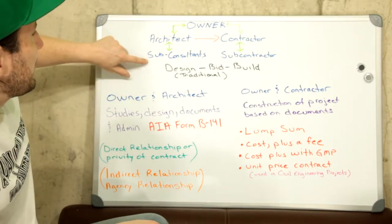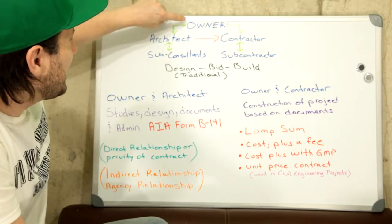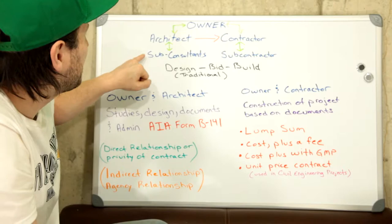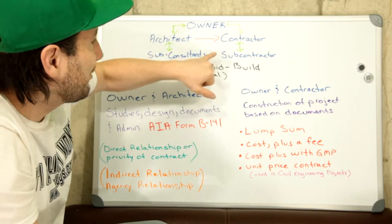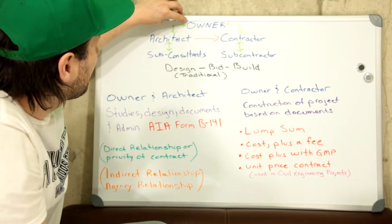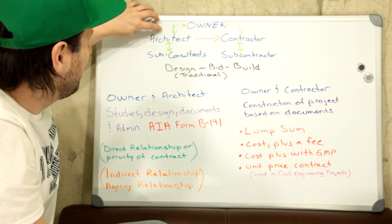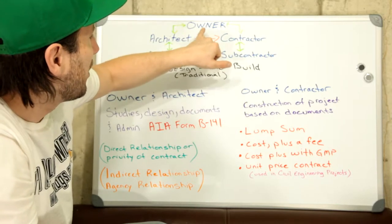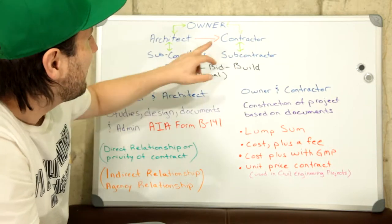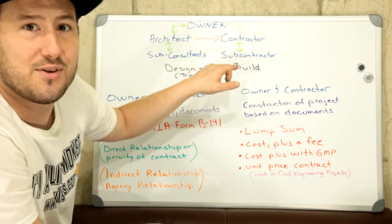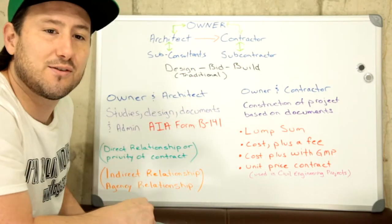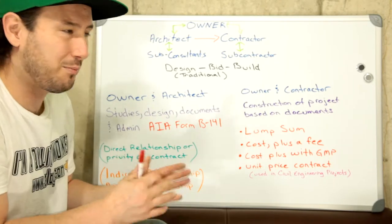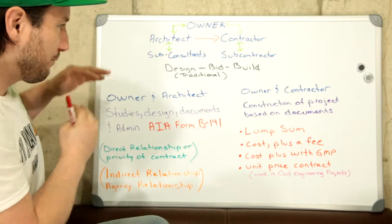So we have the owner, the architect, and the sub-consultants — and there's no contractual relationship between the owner and sub-consultants, or between the owner and subcontractors. For example, if a sub-consultant makes a mistake, the owner will go after the architect for damages — for money lost. Same thing if a subcontractor makes a mistake: the owner will go after the contractor for compensation, and then it's up to the contractor to go after the subcontractor. And the architect will go after the sub-consultant for compensation. This is just a basic outline, and it's already getting a little complex.